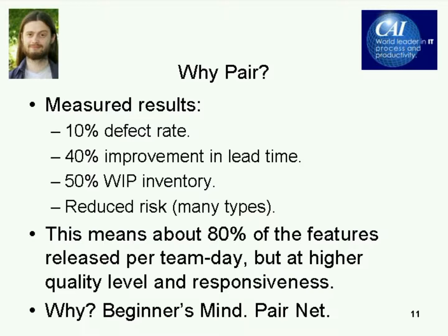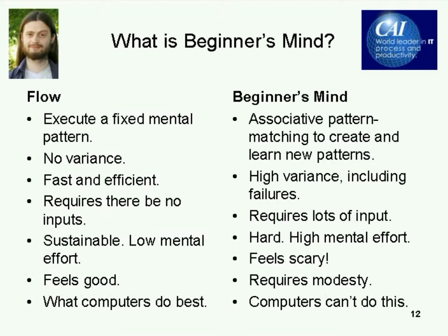To me, the key one here is the reduced work in process inventory. Pairing helps you focus. There are fewer things you're doing at any given time, which means things get out in a shorter lead time. Why does this work? There are two things coming into play here, beginner's mind and PairNet. Actually, there are a whole lot of other ones, but these are, to me, the key reasons it works. So, beginner's mind.